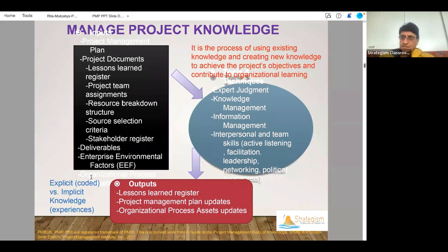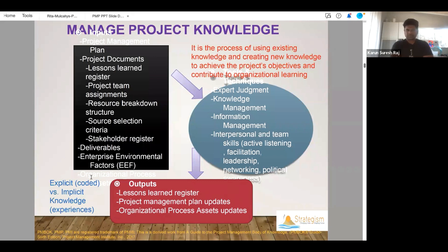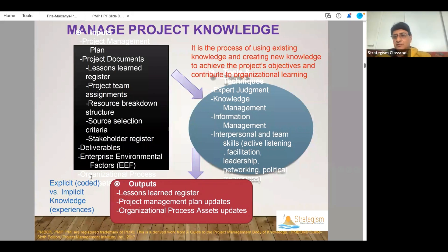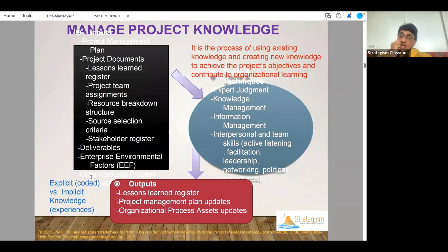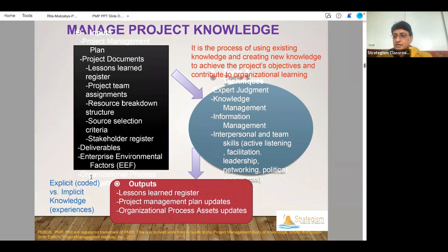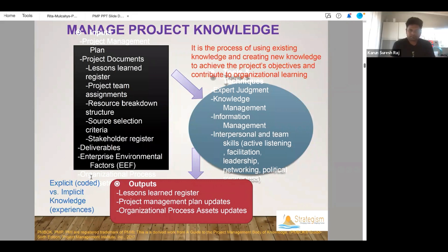Knowledge is created for future reference. And this is still in the execution phase — 'Manage Project Knowledge.' This process was added; it was not there in the previous edition. The idea is that as you are working, you're creating knowledge. Often this was done at the end of the project — lessons learned — and at that time nobody remembers what we did six months ago. You remember high-level things. But if it is a continuous process throughout the project — what did we learn here, we need to do this next time, we need to not repeat this mistake, we need to have the UI guy in our team right from the beginning — those lessons learned are much more valuable.